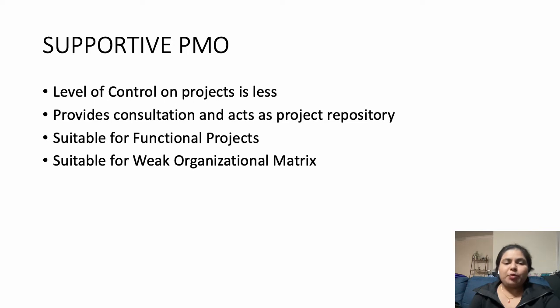Hence, we could say a project team can use a supportive PMO more flexibly, as and when required. These types of PMOs can be used for projects with smaller team sizes and for brownfield projects which don't need to be followed with strict guidelines, quality, schedule, and cost. Shortly speaking, this type of PMO is best suited for organizations with functional or weak matrix organizational structure.